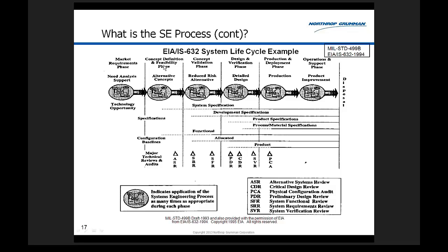These are the old DoD phase names in 1994, folks. So they changed names a lot. Alternative concepts, we look at alternative solutions, and we start writing a spec. See the dotted line? Okay, and we produce some output, and that's input to the next time it's supplied during the concept validation phase. We want to validate that our concept is valid and reduce risks, okay? And we continue work on our system specification. And in parallel with that, we're working on our functional baseline, the functional baseline right here, okay? So we get to a point here at the end here where this dotted line goes solid.